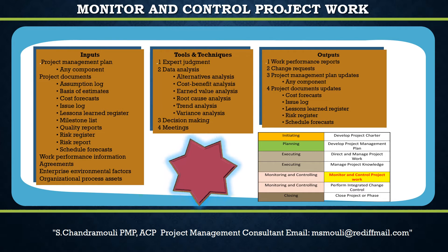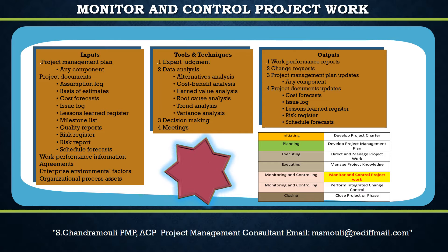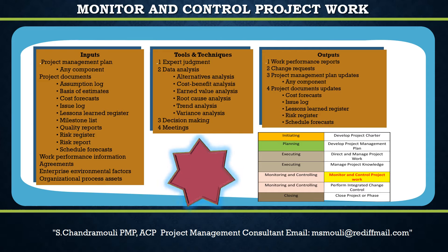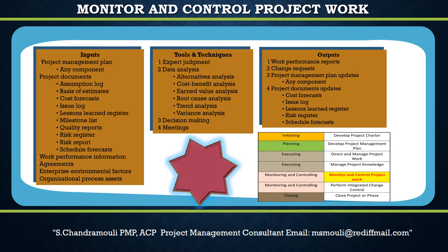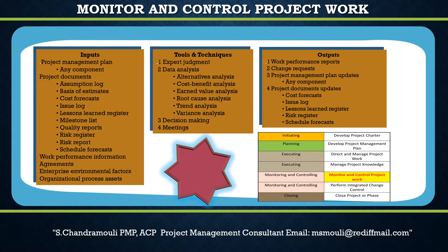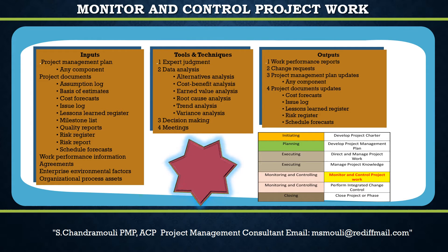In order to record, store, and sometimes distribute work performance information, a physical or electronic representation in the form of project documents is required. Work performance reports are a subset of project documents intended to create awareness and generate decisions or actions. Specific work performance metrics may be defined at the start of the project and included in normal work performance reports provided to key stakeholders. Examples include status reports, memos, justifications, information notes, recommendations, and updates.